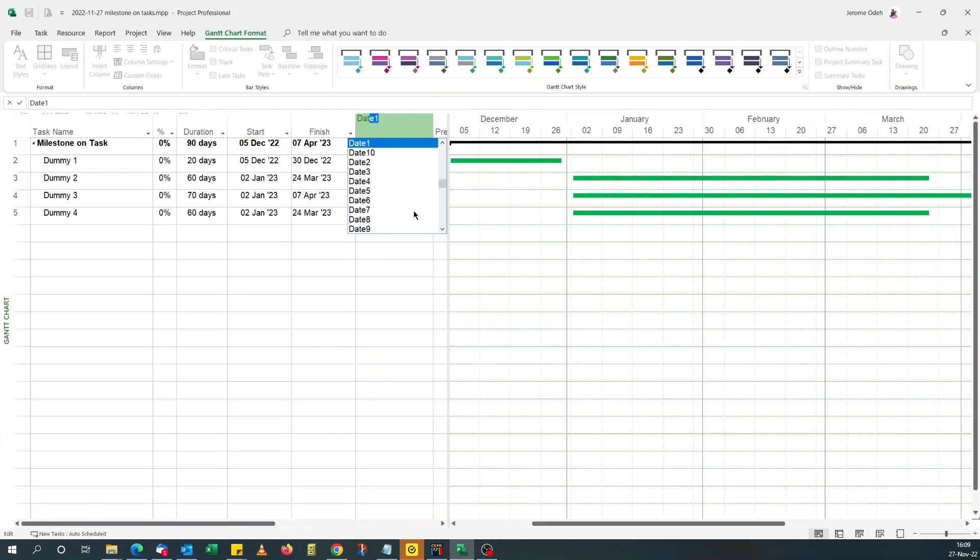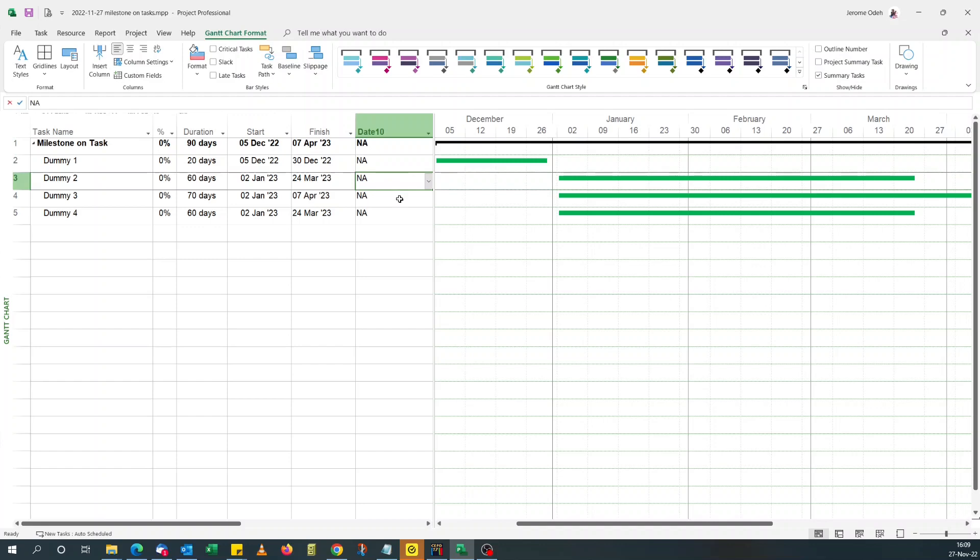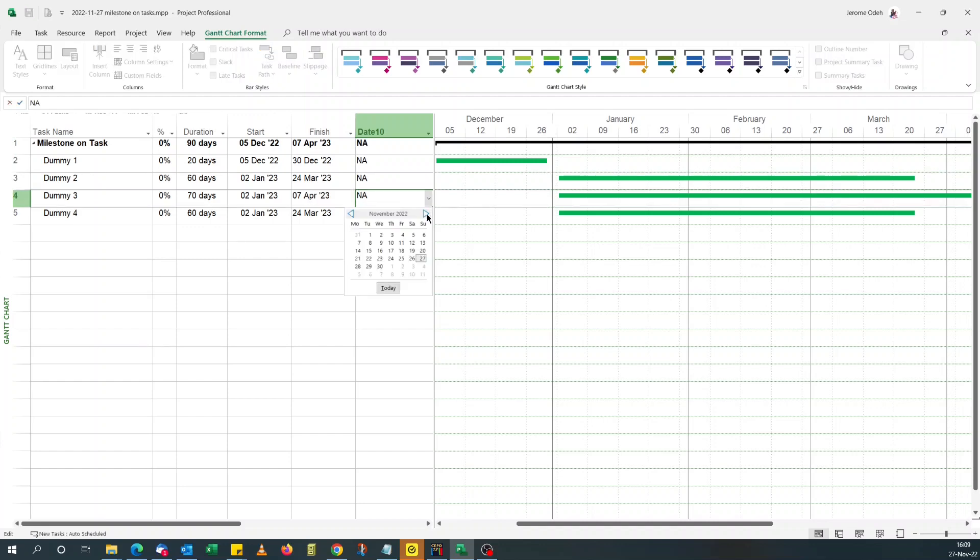I like using the last custom field. So let's go with date 10, and say we select the 1st of February.